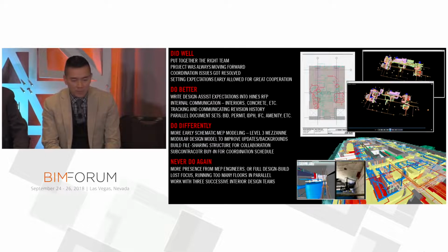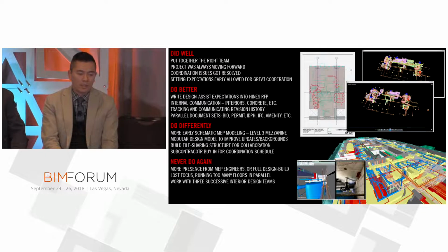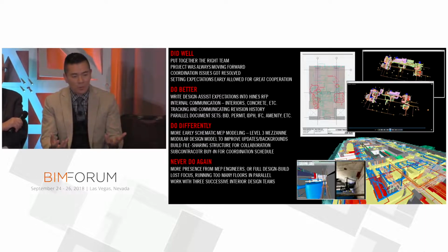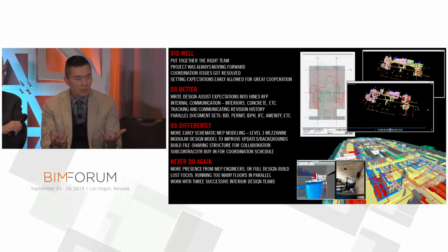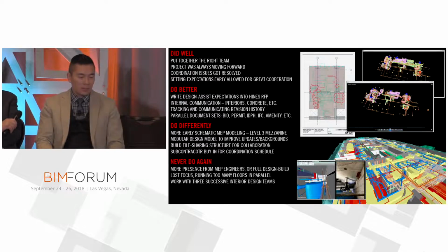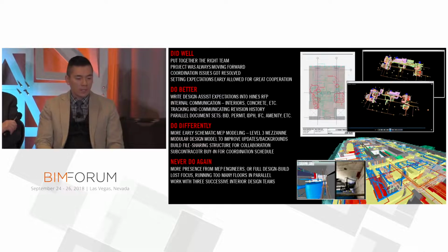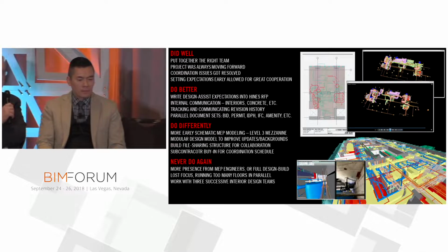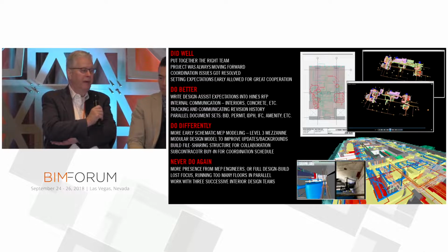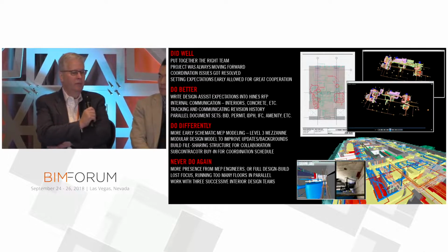Do differently. I would definitely have some more accountability with this design assist approach, because the MEP engineers, what they delivered to the subs, there's just too many holes, and I give so much credit to the MEP FP subs that took on this challenge, because they were really given an incredible challenge that they've worked out, so they've done an incredible job. I think that went back to Dave's comment about design assist, and maybe it wasn't defined well enough.